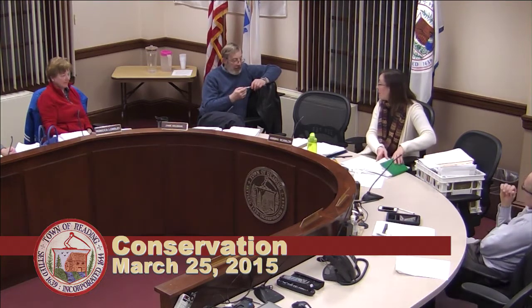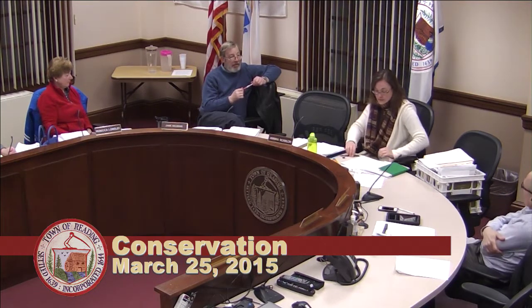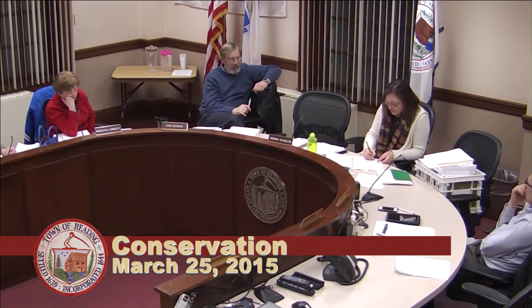Anika, yeah. If you want to get involved, the thing to do is make sure you're notified of the scoping meeting. Make a statement at the scoping meeting. What is a scoping meeting? Before they prepare the environmental impact statement, they have to hold a scoping process. It doesn't have to be a meeting.